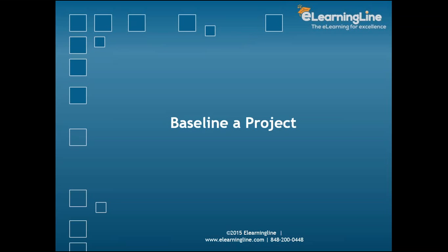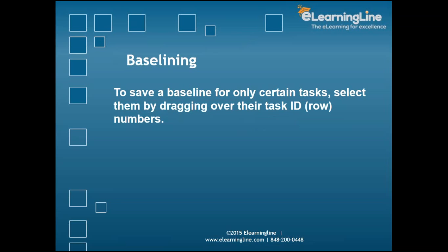Then we have baselining a project. Now how do we baseline a project? You cannot baseline the project unless you have some estimates in place, unless you have the planning estimates or some numbers thrown out on the table for discussion, which you can take as a baseline. Because once you have that, only then can you see what you are going to measure against. So you have a baseline number and then you have the actuals. That is the place where you will analyze the variance. We have talked about this before.